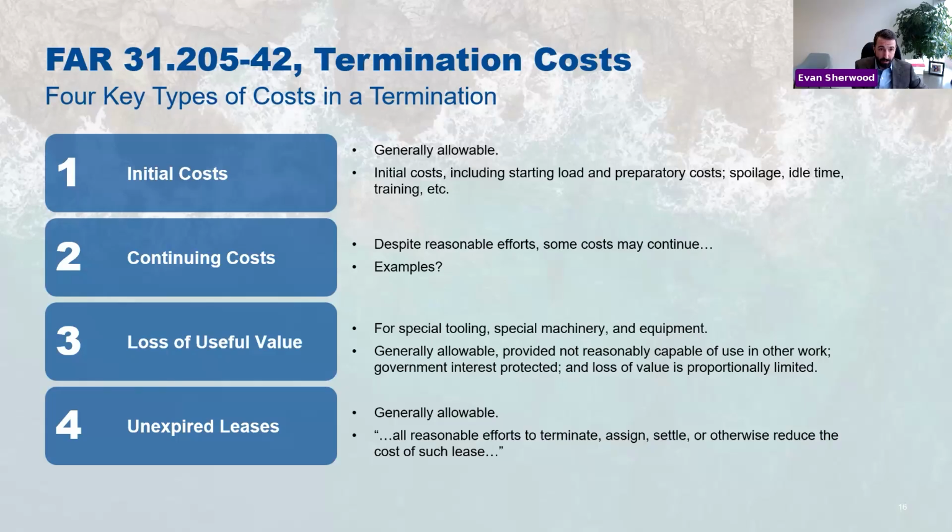The government's going to ask, well, why did you sign up for 1 year? Well, I was expecting the agreement to last a year. Okay, you didn't want to negotiate an early exit clause? Well, I wasn't anticipating that. And if I'd asked the landlord for an early exit clause, they would have increased the rent 50%, which would have been expensive. So no, that wasn't commercially reasonable. All right, see, we're back in cost reasonableness. Okay, so it was reasonable to negotiate a 1 year lease.